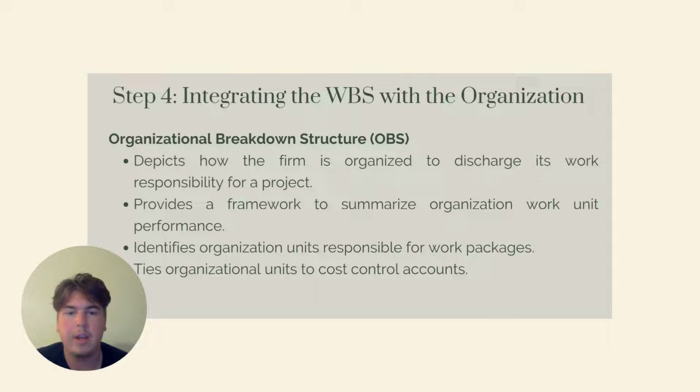So step four, integrating the WBS with the organization. The OBS depicts how the firm is organized to discharge its work responsibility for the project, provides a framework to summarize organization work unit performance, identifies organization units responsible for work packages, and ties organizational units to cost control accounts. As I've stated, we are doing this. This is definitely a good group project that we have been able to all come together and really put all of our heads in and try to get this thing done.